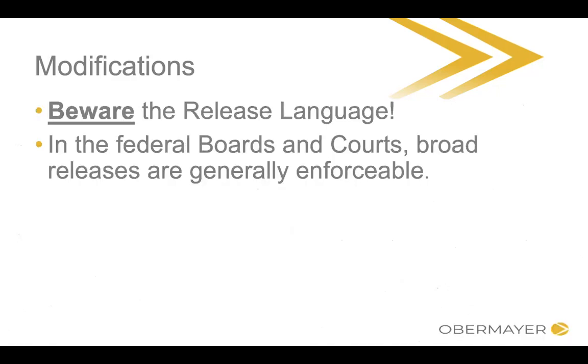So this comes up sometimes if you get an express change in the form of a modification. You're like, all right, we agreed that you were going to issue a mod, but I asked for $1 million and you're giving me 200,000, and I asked for a month and you're giving me a day. No, that's not enough. That's not what I need for this change. You need to make sure you don't sign a mod that's got that kind of waiver language in it, or that's all you're getting.